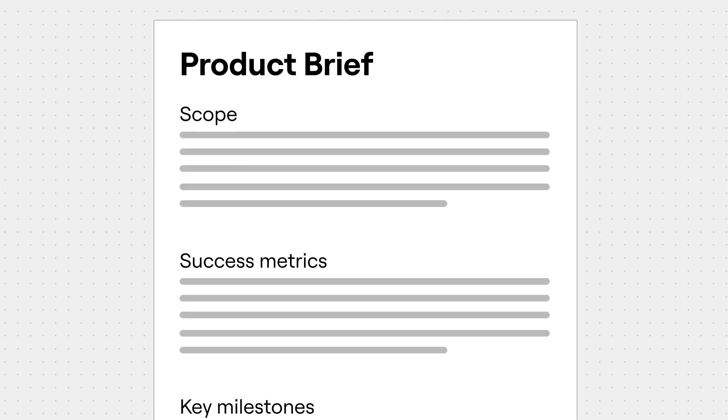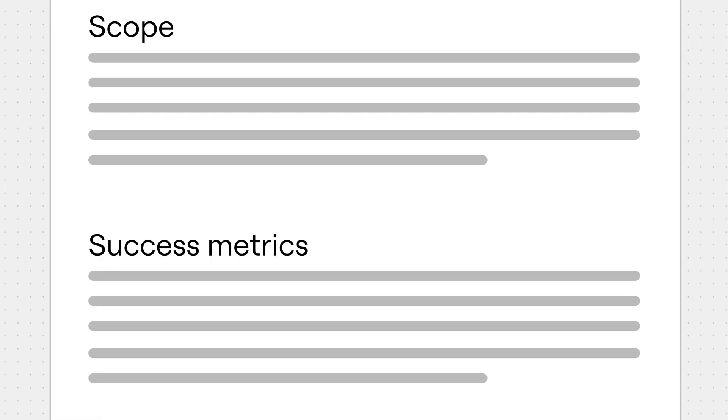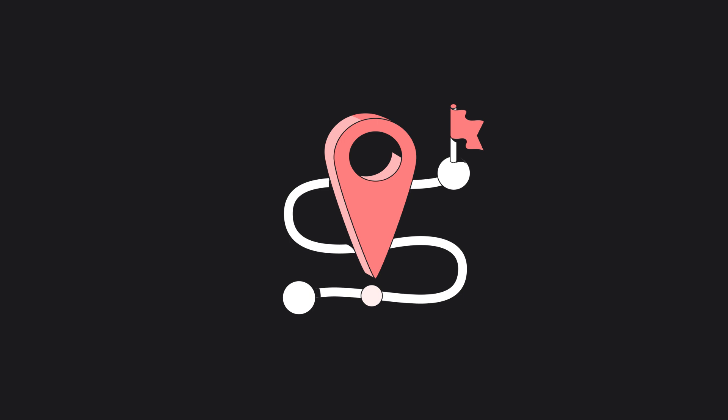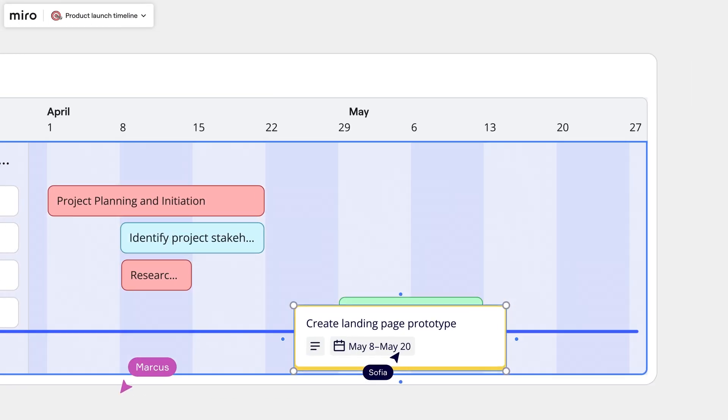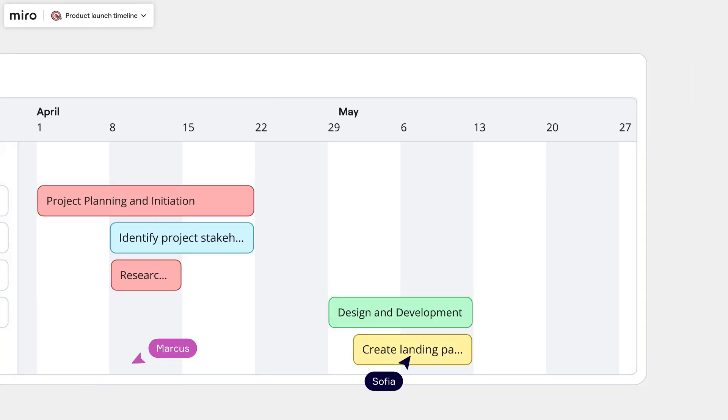Our goal here is to turn our product brief — the what — into the how: a concrete plan for delivering it. We break down the complete solution into key milestones. The result is a roadmap that defines the path we'll take to build the whole solution.